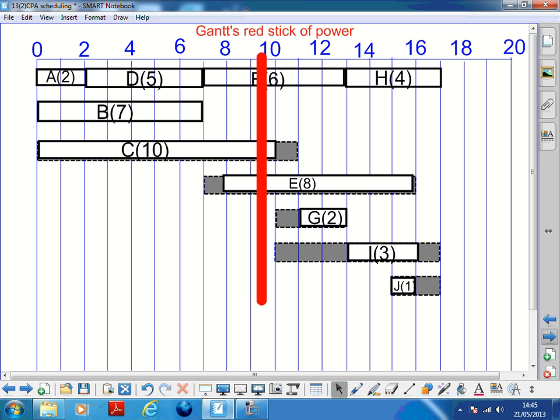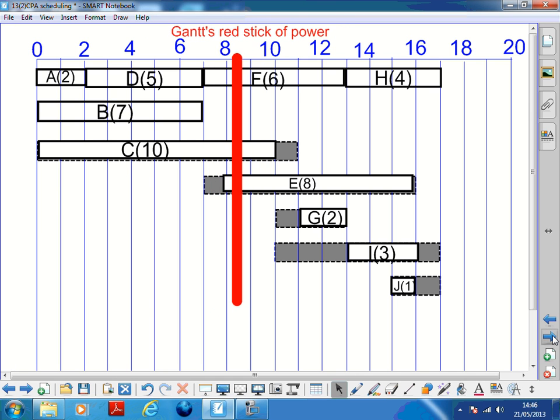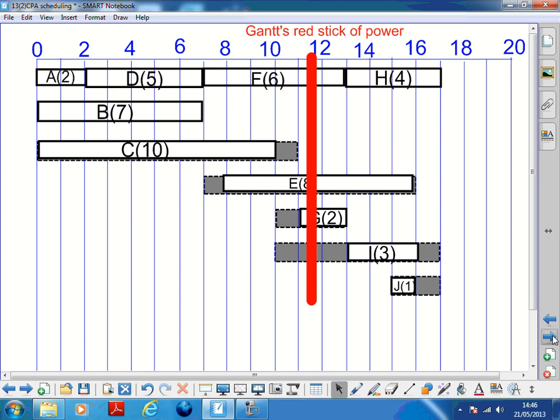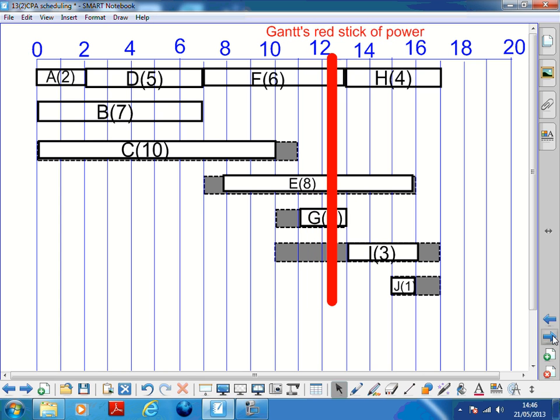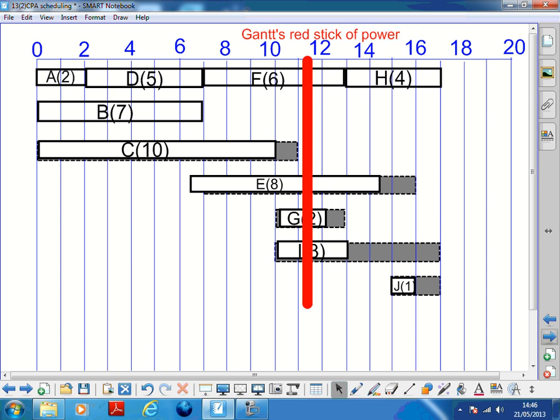Now maybe there's a day where 4 have to be happening. So even though we knew there was a lower bound of 3, it doesn't mean that there isn't a day on which 4 workers are needed. So we have to move this across and think, is there a day, there's 2 there, 3 there, 3, that's 2 workers, that's 3 workers needed on that day, that's 2 workers because I could move G left. Sometimes, worst case scenario, you have to really think, because you start shoving everything to the left of its float to get it out of the way, and you don't realise that in doing so you create a day on which...